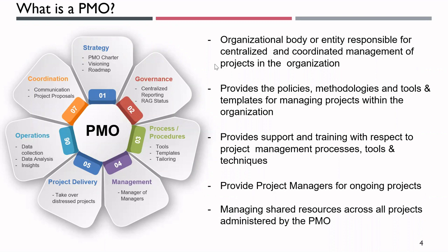The sixth one is obviously metrics and data collection. This is more of a regular operational BAU activity of the PMO, wherein they collect data, analyze data, crunch the numbers, and provide insights. Most importantly, what comes out of this is a dashboard. A management reporting dashboard is created and published at periodic intervals to the leadership team. So this is one of the crucial roles of the PMO related to data and operations.